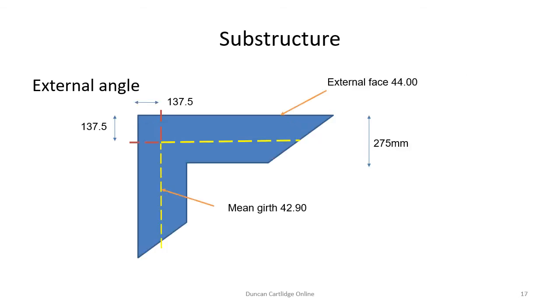Centre lines are calculated on the basis of the number of external angles. This slide shows one external angle from the previous slide. When using the external dimension, for each external angle, it is necessary to deduct half the thickness of the wall from both the length and the width. And then multiply this by the number of external angles, which in this case is 4.